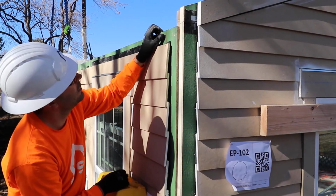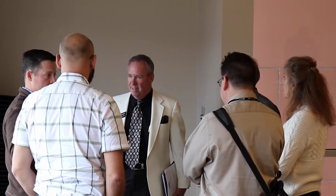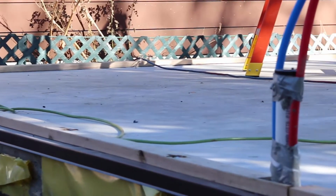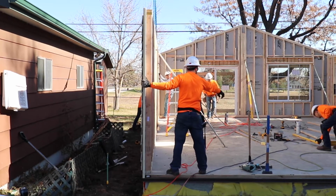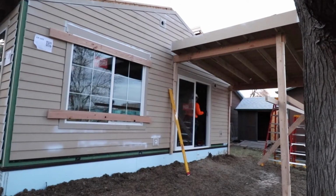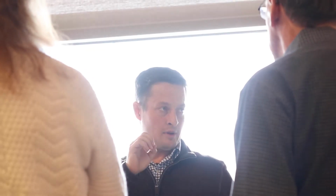What you can do if you're building it all on the flat and you're not working against gravity, and you don't have adverse weather conditions, and we basically won't allow any water to get in the house, or very, very little, because we can go from foundation, the one in Arvada, foundation to closed in about 4 hours. So you're immediately dried in. And so the critical path for a contractor from my L&D side is, how do we get from foundation to closed in so my mechanical, electrical, plumbing guys are working as quickly as possible? So that's our biggest value prop in the beginning.